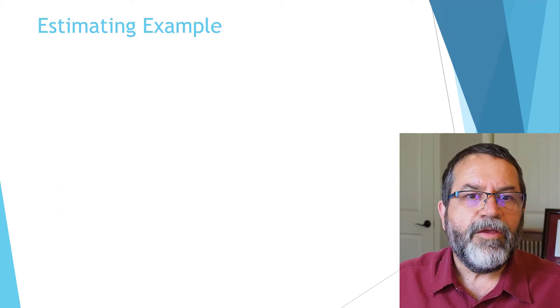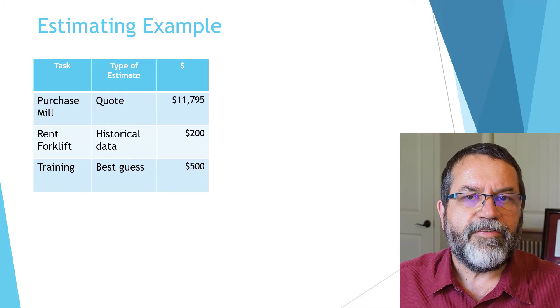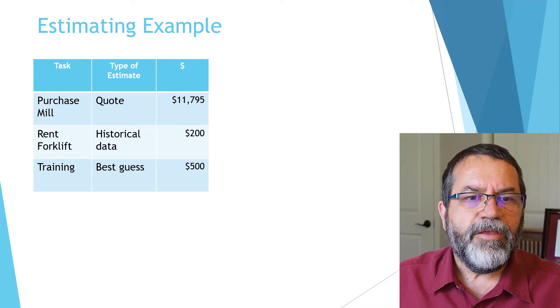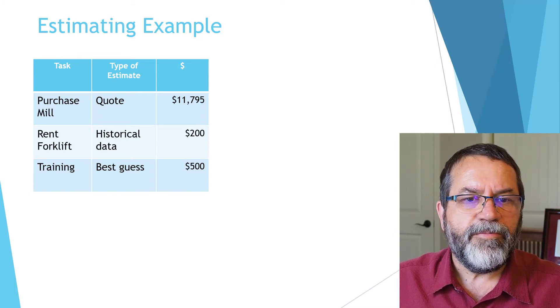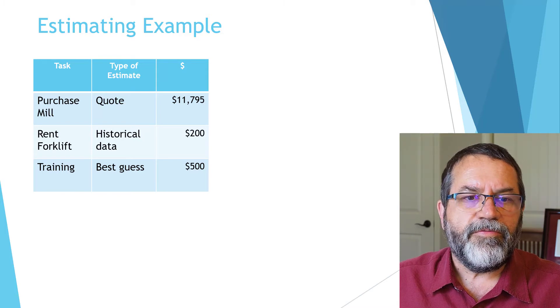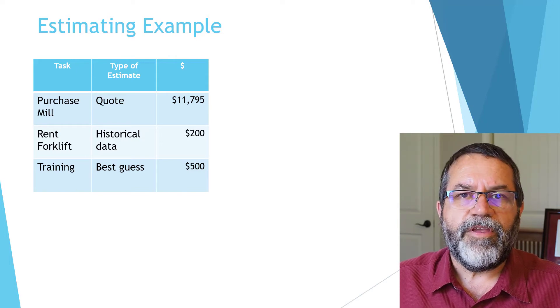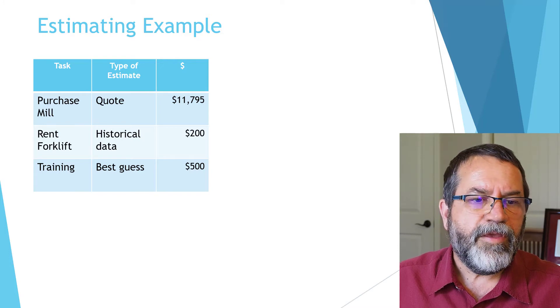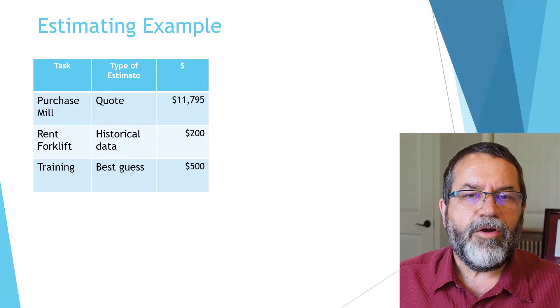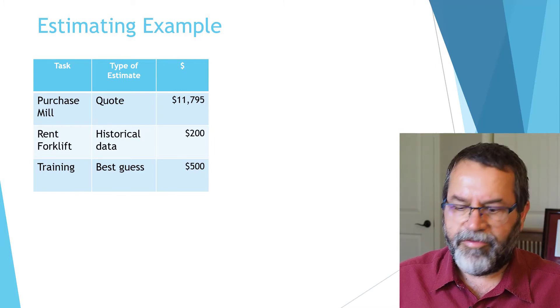Let's look at a simple example. This project has only three components: we're going to purchase a mill, rent a forklift, and do some training. I have three kinds of estimates. I have a quote from the vendor for the mill at $11,795. For renting the forklift, I've got historical data at $200. And for training, I don't have good information, so I'm taking a guess at $500.